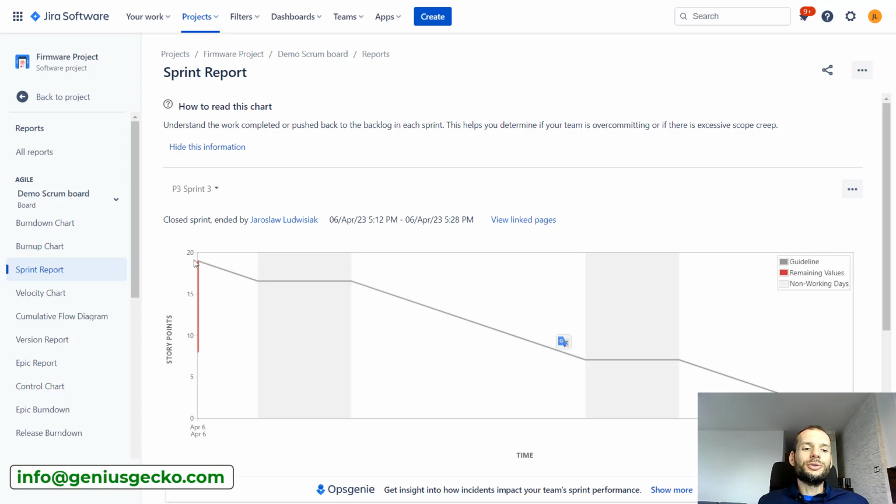Or you do not want to have something like the red line being very, very horizontal over here just to drop right at the end, because this basically means that your team is struggling at the beginning of a sprint. They cannot deliver tasks and they are doing everything at the end, very often spending overtime, which is not the best.